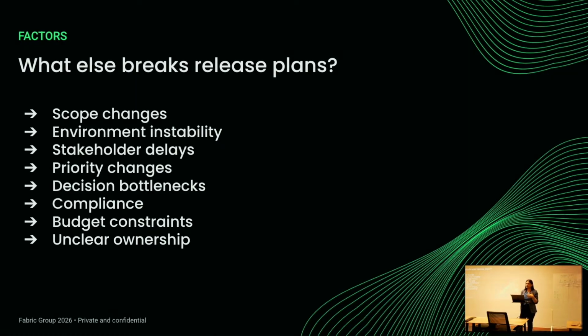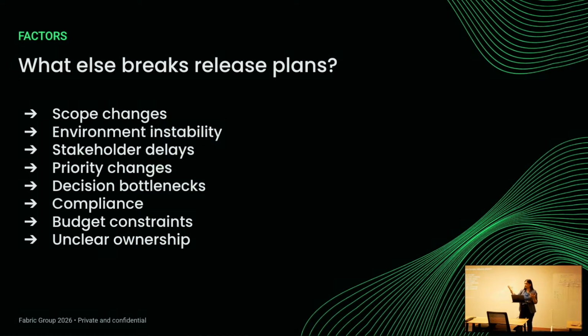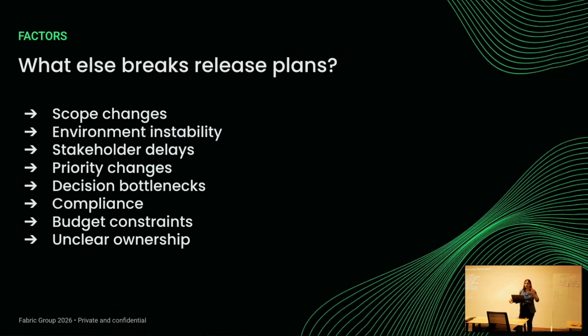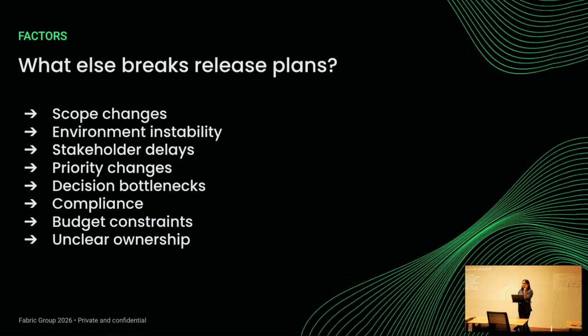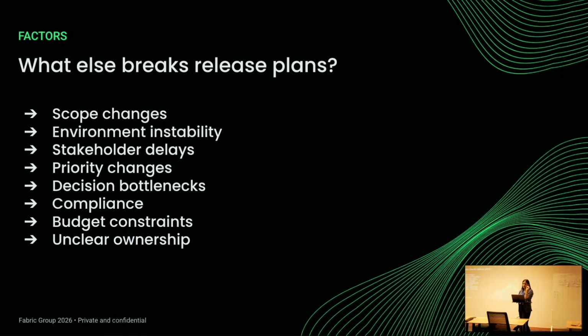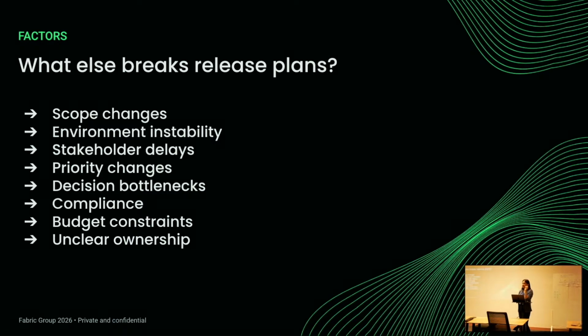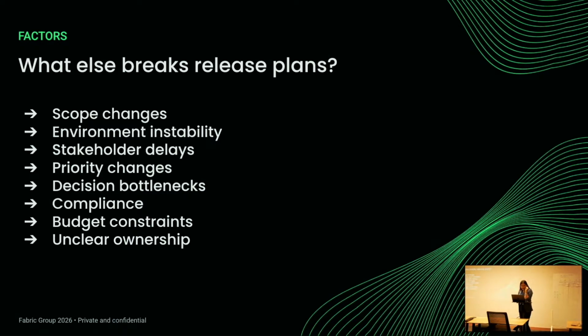So there are no delays, because now we've identified that one person who will approve all of the things from the process side, who will probably approve the ACs on the story cards, things like that. So very important: whenever we kickstart a project, there should be a ways of working workshop that we do with the client, something which could be another meetup topic.